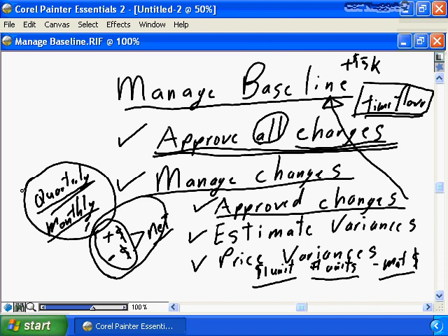Are we going to change the scope, the functionality, to try to deliver within the original costs with less function? Maybe changing the timeline again can help you give budget relief. Once you work with management, once you determine what the appropriate action is going to be to provide the budget relief, you then have an approved change to the project.